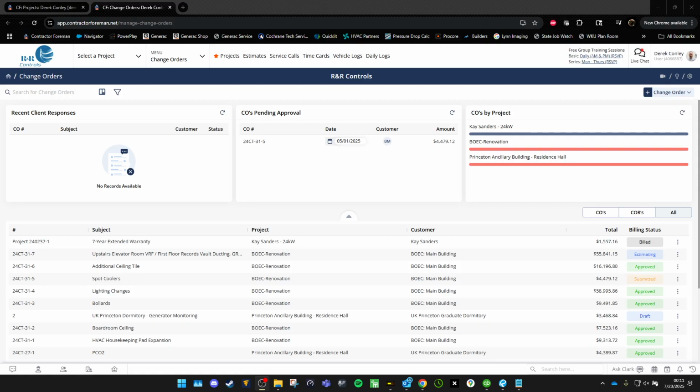An example of a change order coming by accident. That's not a change in scope necessarily. Well, it is, but it just happened because something bad happened. Bank of Emerson County ceiling tile replacement. We were supposed to reuse a bunch of ceiling tile. That ceiling tile got thrown away. So a change order was issued to replace that ceiling tile.